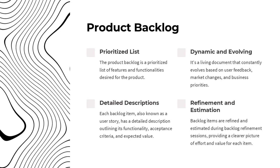The product backlog is a prioritized list of features and functionalities desired for the product. It's a living document that constantly evolves based on user feedback, market changes, and business priorities. Each backlog item, also known as a user story, has a detailed description outlining its functionality, acceptance criteria, and expected value. Backlog items are refined and estimated during backlog refinement sessions, providing a clearer picture of effort and value for each item.